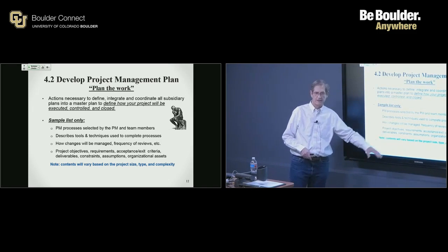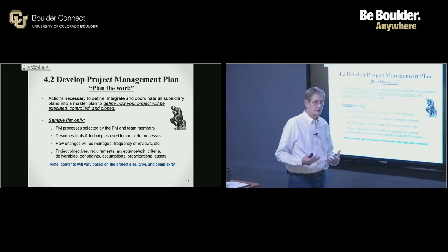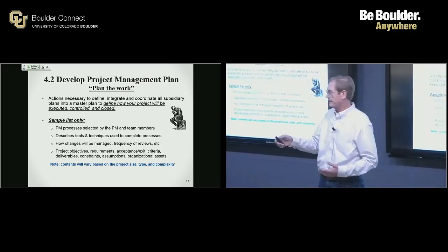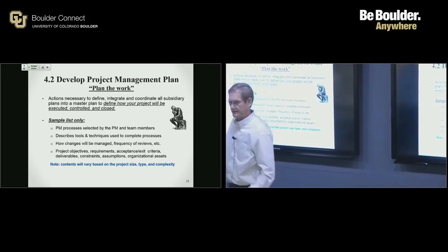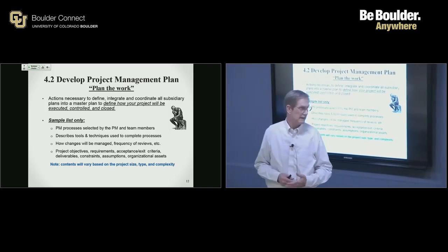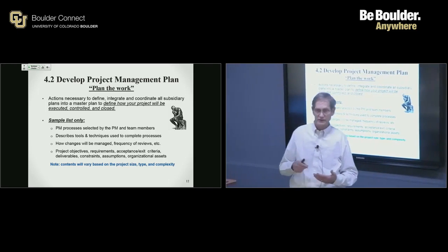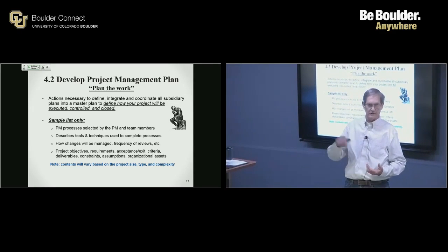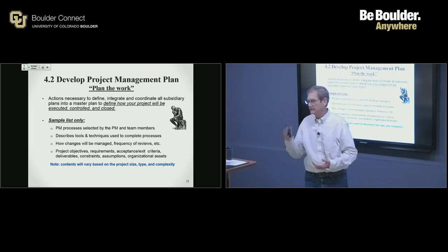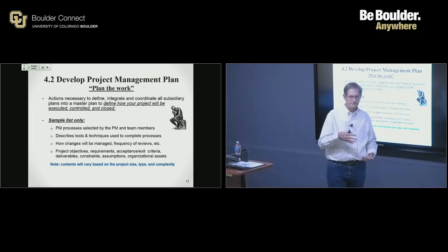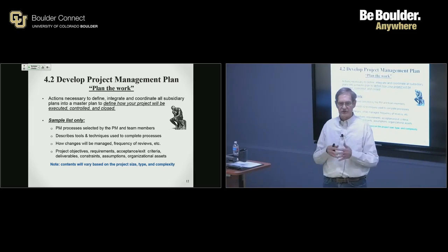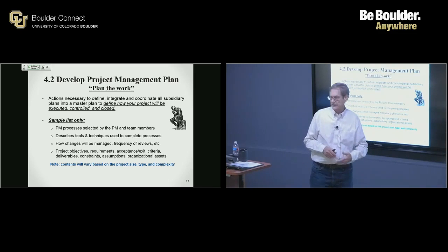Objectives, requirements, acceptance criteria. What constitutes being done on this project? How do we know when we've arrived each step of the way? And typically that's done by some kind of a checkpoint, right? On a construction project, that's where your city inspectors come in and they review rough plumbing, sign here. Framework, rough electrical, sign here. So think of your project in an organized fashion as a series of check marks. That's what we're striving for. What are those things that we need to do first, second, and third? And we'll talk more about that during schedule management.